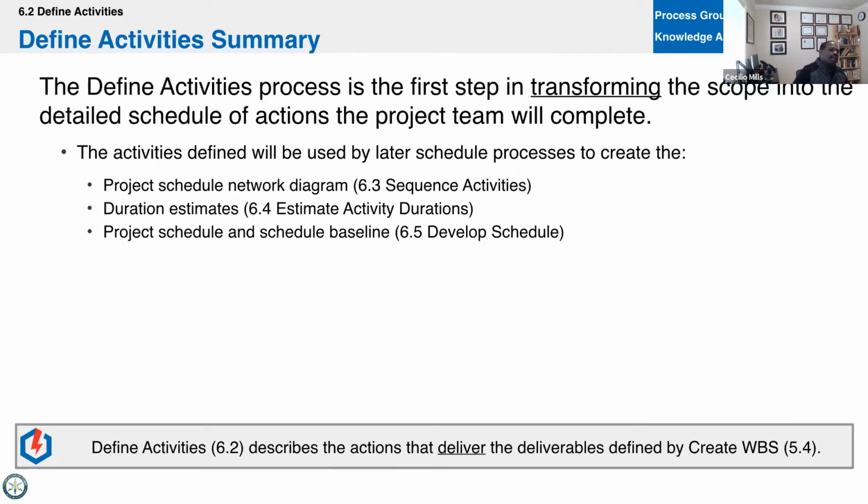Verbs and nouns. Let's say I need to make an office that I could do a PMP training classroom in. Well, I need lighting, flooring, furniture, HVAC, and a presentation system. If I look at the presentation system, I need a camera, a laptop, a microphone, and a screen. And if I look at the camera, I would say, okay, I need inputs, lighting, something else, right?